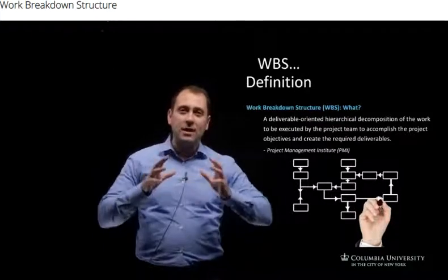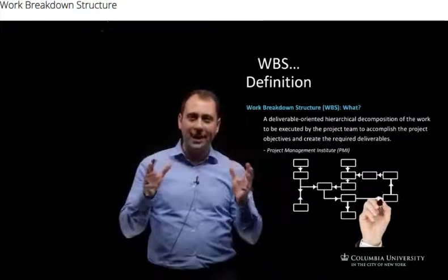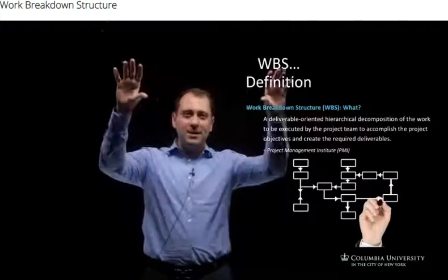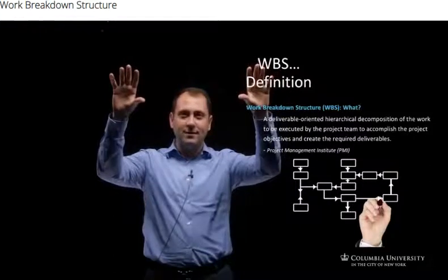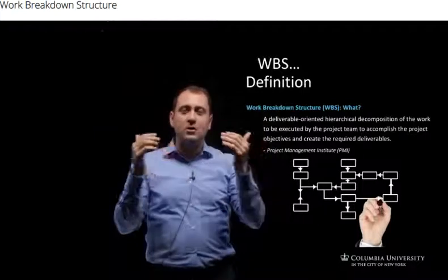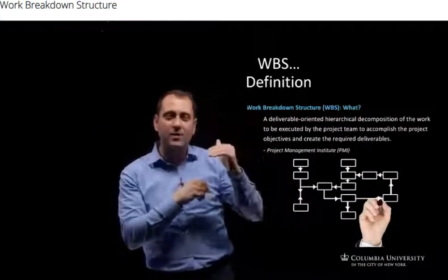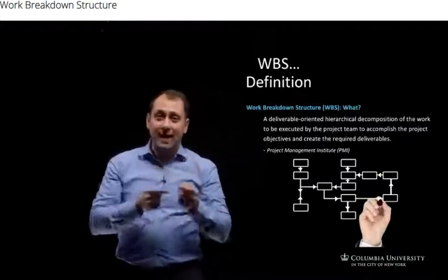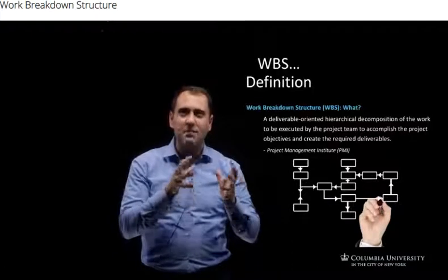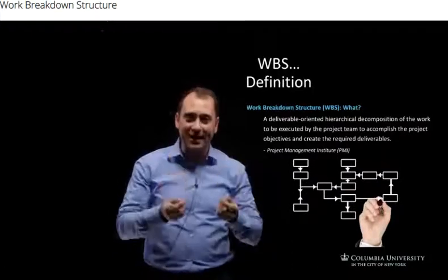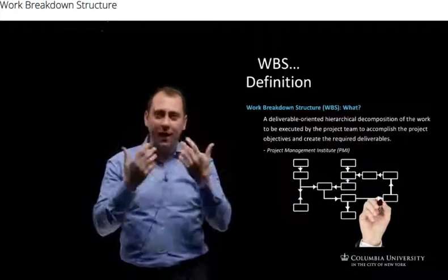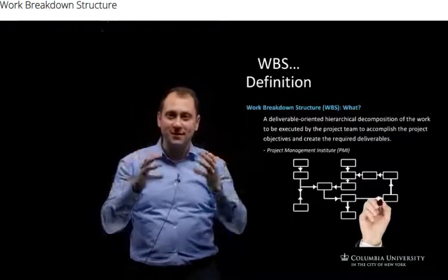It describes usually, the WBS, the project scope, in a hierarchy of work packages. So each work package in the higher level of the hierarchy is subdivided into more detailed work packages or sub-work packages in the lower levels of the hierarchy. So project managers refer to this WBS as the foundation of the project or the project planning, which will help, if you think about it, the project manager to think ahead of time while looking at the project in total.